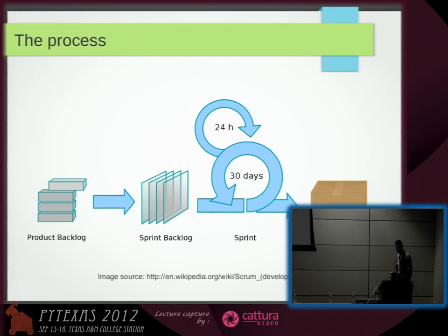The role is called product owner. And he sorts the backlog in a priority before every sprint. And then he sits down and talks to the team and says, OK, this is what we need to do. These top things are my highest priority. What can you do? They say, we think we can do things 1, 2, and 4. Why not 1, 2, and 3? They say, well, maybe 4 is one that relates more to things 1 and 2, so it makes more sense to us to do it. And then he says, OK.